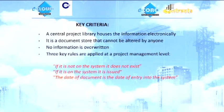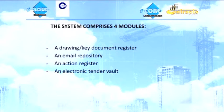Key rules that are applied at a project management level are: if it's not on the system, it doesn't exist, so never refer to it. If it is on the system, it's issued and you've read it. And the date of the document is the date it enters the system, no other date. The system comprises four modules: a drawing and key document register, an email repository, an action register, and an electronic tender vault. So, those are the four basic modules.